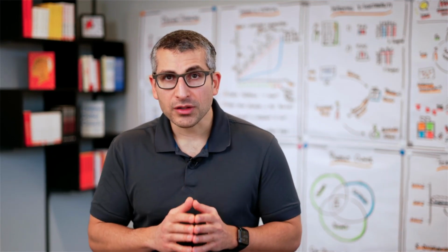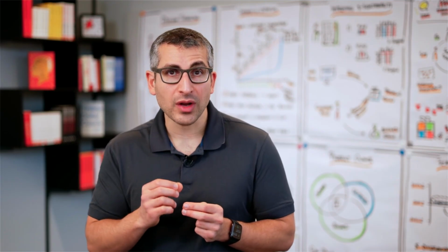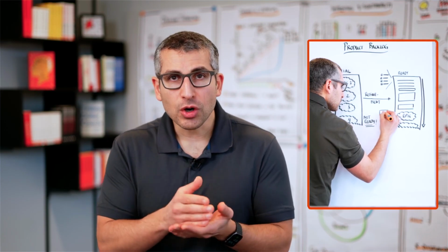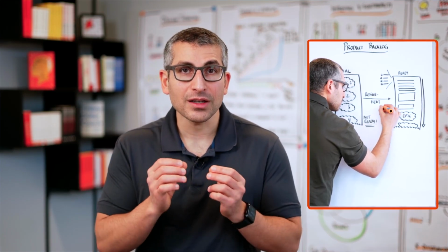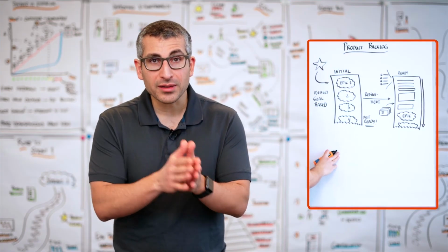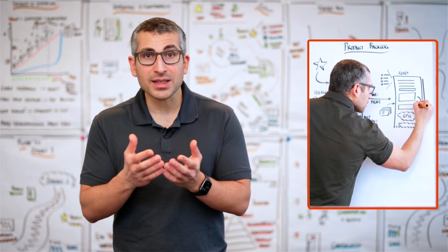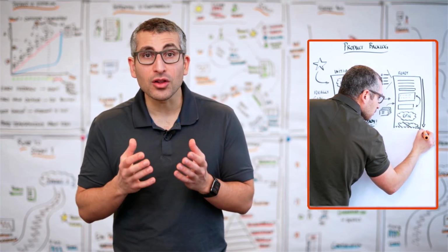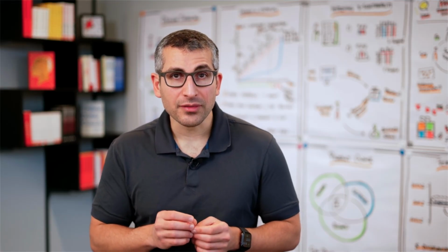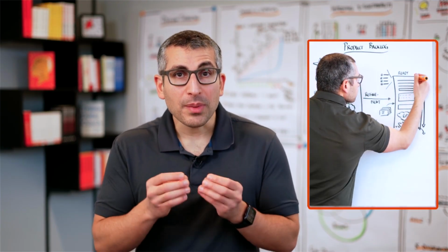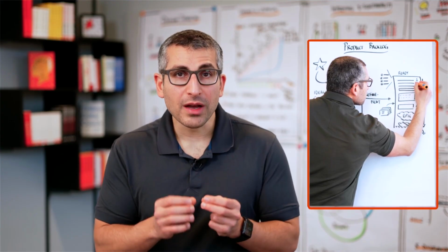There are two other characteristics that we would want a product backlog to have. The first one is that product backlog being emergent. Emergent means the product backlog is a living document. Based on the conversations with our stakeholders, we would probably add new items to our backlog, reprioritize existing items, break them down, or maybe remove items that are no longer valuable to us. The other characteristic that we want a product backlog to have is it to be estimated. This does not have to be the full backlog, but ideally the part at the top which we have already detailed down.